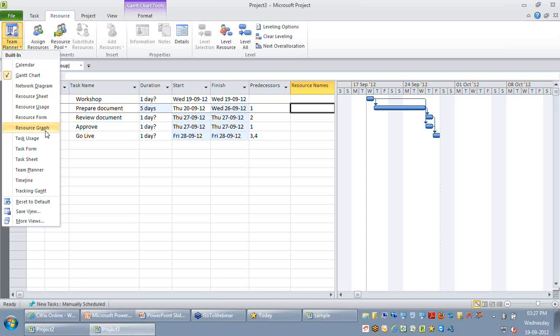What I mean by standard and night shift is the offshore resource is going to be following the 8 to 5 timing. And maybe the on-site resource is using the night shift calendar, which is night 9 to morning 8. So let's make this assumption, and I'll go back to my Gantt chart.